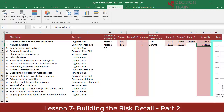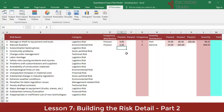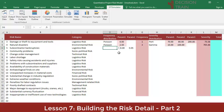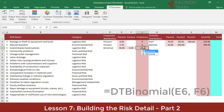We now go to a risk of a different nature: subcontractor bankruptcies. Again, this is not a happen or do-not-happen type of risk. Assume there is a list of 30 subcontractors on this project, each of them exposed to the risk of bankruptcy. Assume for simplification purposes that all of them have the same bankruptcy probability of 5%. There is a distribution that serves exactly this — to count the frequency of events where there are multiple units, each exposed to the same individual probability. That is the binomial distribution. Select DT binomial in D6.